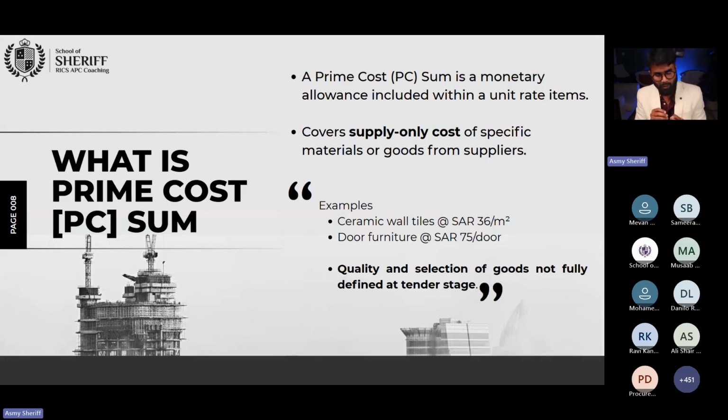PC sum. Very simple. While I was working for Qatar, I was handling some kind of P6 and P12 PWO contract. So a very small sum of the buildings they need to construct throughout the road construction. So for those buildings, the employer mentioned PC cost for bathroom accessories, including tap. For an example, he mentioned tap, 250 riyal. He mentioned tiles, 350 riyal. He just mentioned some items.